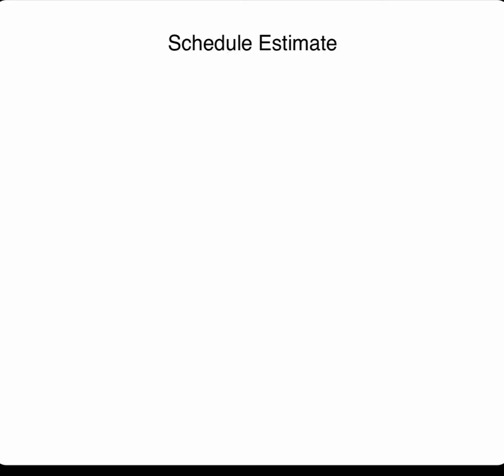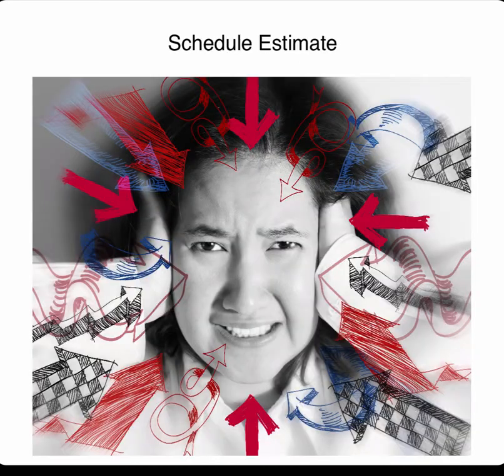Let's look at the schedule estimate. Now there's no need to pull your hair out over establishing a budget estimate. But you will pull your hair out if you don't provide a good estimate on the cost of your project. So now that you have a ballpark figure of what the project plan will cost, you now need to spread it out over 4 years. This corresponds with the business case financial spreadsheet.